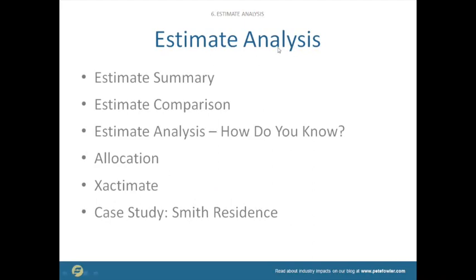So ultimately, doing an estimate analysis. If you're going to analyze three construction cost estimates and compare them to each other, you've got to organize them the same way so you can break them down. A basic level of estimate analysis is: Bob says it's 100 grand, Steve says it's 200 grand, and Ed says it's 300 grand.